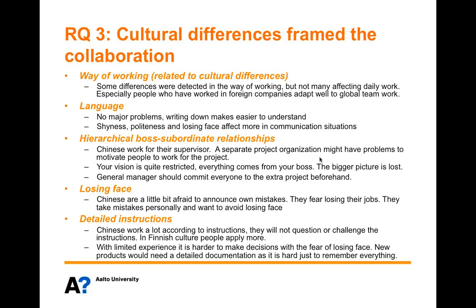Chinese people also have this feature of losing face, so they don't want to get embarrassed, and this leads to them being a little bit afraid to announce their own mistakes, and they fear losing their jobs. So it can be a hindrance to open information and status sharing, and can create some problems. And they want detailed instructions, because first of all they work a lot according to instructions, and they will not question or challenge the instructions so much. Maybe in Finnish culture people apply more, and it's also related to the experience of the people in the Finland factory being a lot more than in the China factory, so it's easier to make decisions and apply than in China.